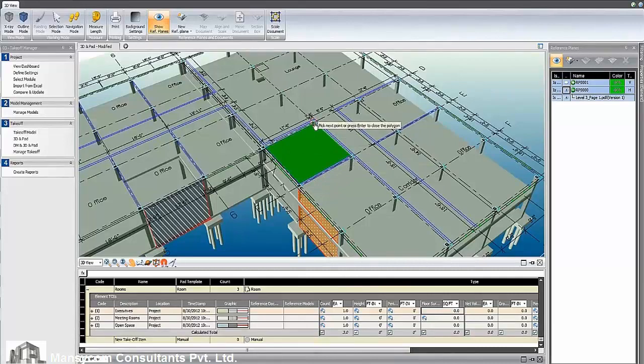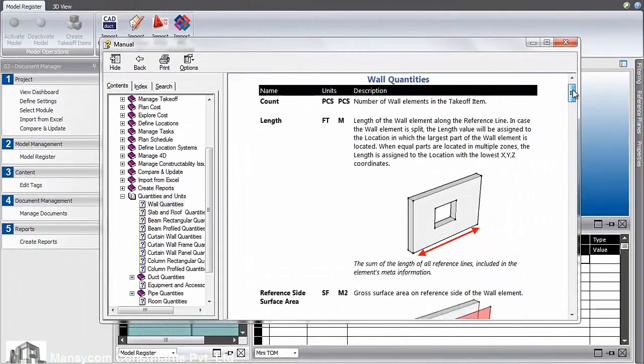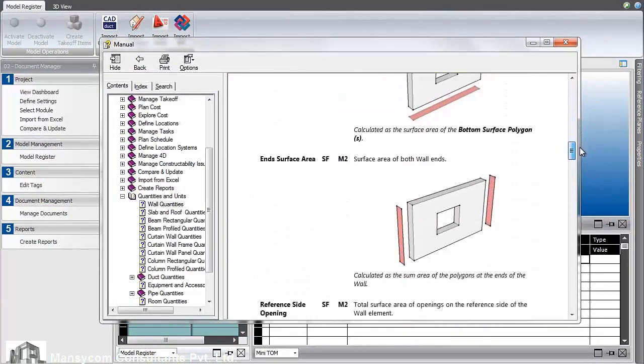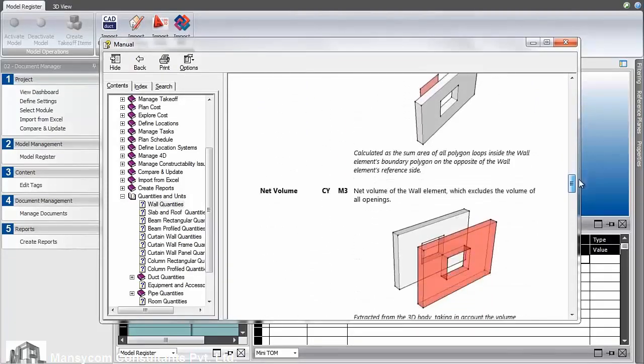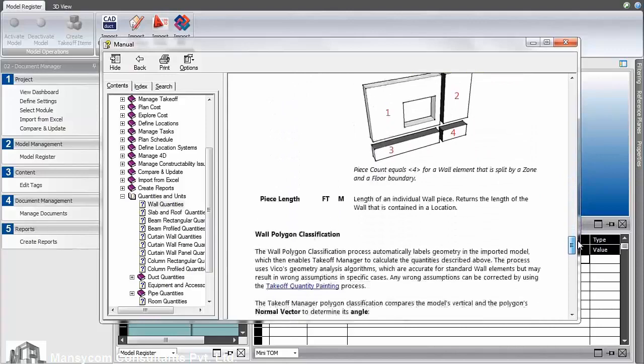Importantly, as the 2D drawings are scaled and placed in the correct building location, as I mentioned, this will be a location-based quantity takeoff. From the 3D building elements, we can calculate accurate quantities, not just rudimentary count, area, and length, but true construction caliber quantities that are valuable for estimators and schedulers.